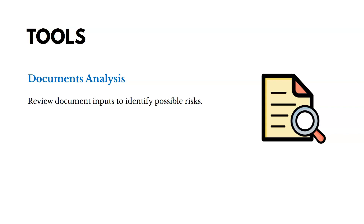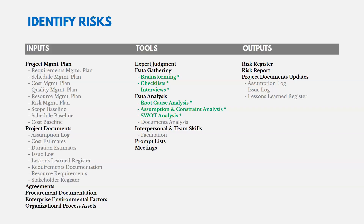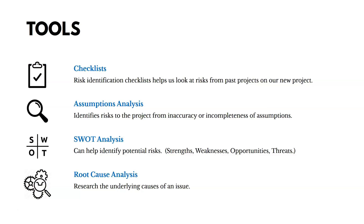Some tools for identifying risks include document analysis — reviewing document inputs to identify possible risks. You also have checklists: risk identification checklists that look at risks from past projects and apply them to the new project. You walk through the checklist asking, 'Could this be a risk for us now?' for each item.